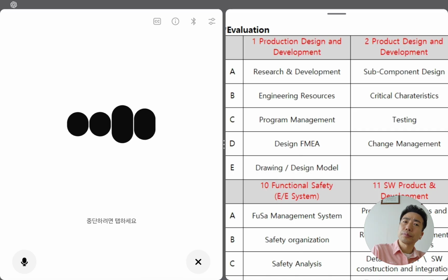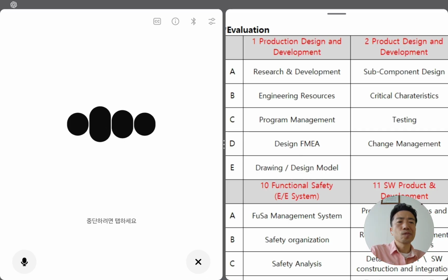2. What process do you follow when a customer drawing is updated, and how do you make sure internal teams and suppliers adopt that change? Answer: When a customer drawing is updated, we receive the new version through our customer portal. We then review it internally, update our system, and issue an engineering change notice. This change notice is sent to all internal teams and suppliers. We confirm adoption through acknowledgement and audits.